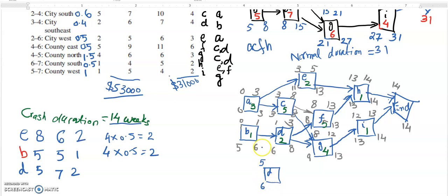Okay, which is 1. So basically when some activities are in a series and they are showing individual slacks, actually that individual slack is not an individual slack, it is a shared slack. So in the previous case we have used a slack of 4 in activity B, therefore the only slack available in D is now 1. Which means that we can only relax this activity by 1 day. So we can change its duration from 2 to 3 days. That means just 1 day of change, and this will be at a saving of 0.4 per week. Okay, so it will be 0.4.